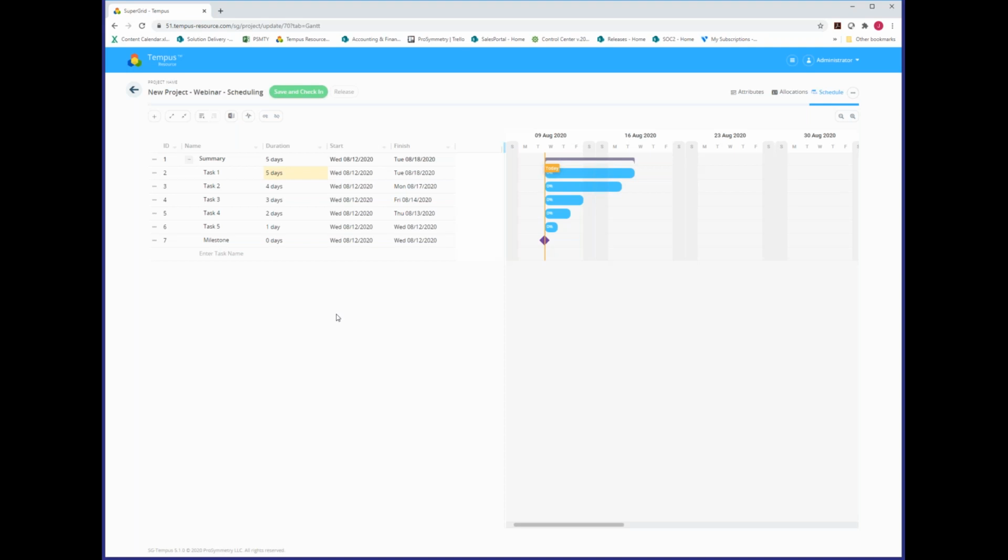And the last thing I'll show you before we move on to some things around some of those other task types, other features, is creating task relationships. So we've set and built our structure. So we have our summary, our milestones, our tasks. So the summary, again, is a roll-up of everything beneath it. Notice it's now matching the max of the durations for the tasks underneath it.